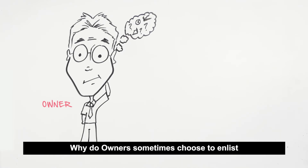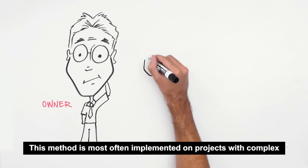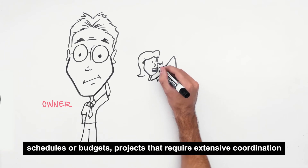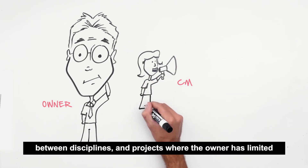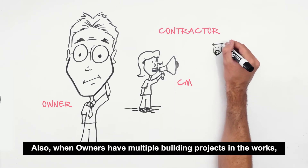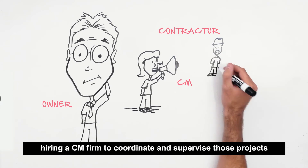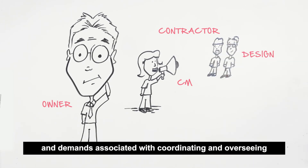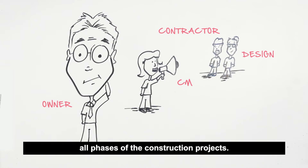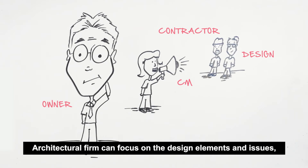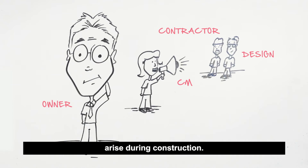Why do owners sometimes choose to enlist a construction management firm? This method is most often implemented on projects with complex schedules or budgets, projects that require extensive coordination between disciplines, and projects where the owner has limited expertise with regard to design and construction. Also, when owners have multiple building projects underway, hiring a CM firm to coordinate and supervise those projects can be an efficient and effective way to manage the complexity. Some owners also prefer using a CM firm so that the architectural firm can focus on design elements, leaving the CM firm to handle issues that arise during construction.